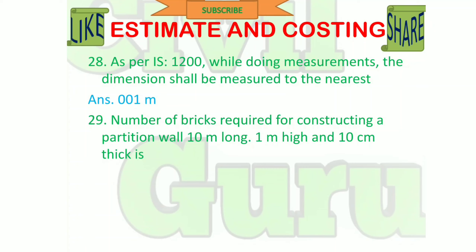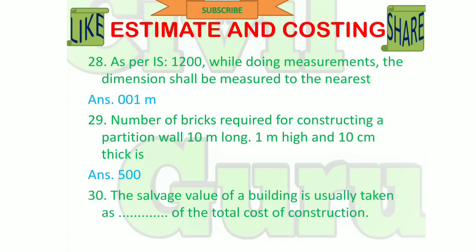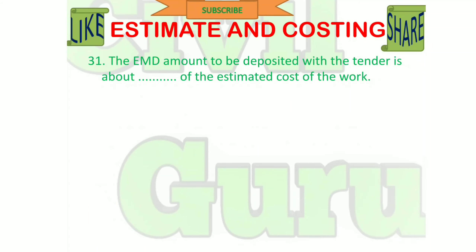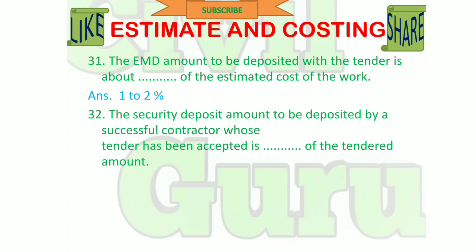Number of bricks required for constructing a partition wall 10 meters long, 1 meter height and 10 cm thick is 500. The salvage value of a building is usually taken as 10% of the total cost of construction. The EMD amount to be deposited with the tender is about 1 to 2% of the estimated cost of the work. The security deposit to be deposited by a successful contractor is 10% of the tender amount.